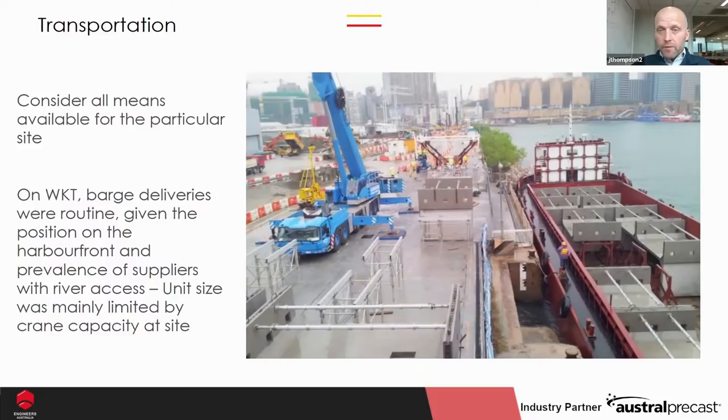There was no real limit on what we could put into an incoming barge. The unit size was mainly limited by the size of the crane that we could put on the quayside, which was limited by it being close to the quayside and a fairly fragile seawall.